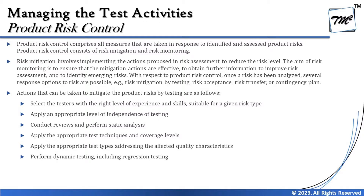Risk mitigation involves implementing the actions proposed in risk assessment to reduce the risk level. The aim of risk monitoring is to ensure that mitigation actions are effective, to obtain further information to improve risk assessment, and to identify any emerging risks. Product risk analysis is not a one-time activity — at the beginning of the project we may not have full visibility to identify all risks.